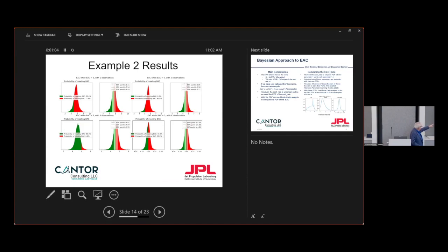By reducing this cost rate, you put yourself back on track. And now you're looking at a 93% chance of meeting the probability distribution. And then at the end, you have a good narrow distribution. It's not as narrow as the first example, but you're back on track, and your 80% point is 5.06 rather than 5.01 like in the first example.